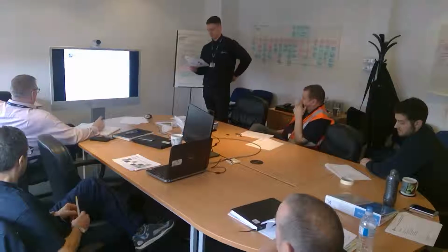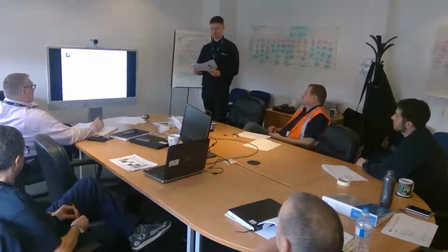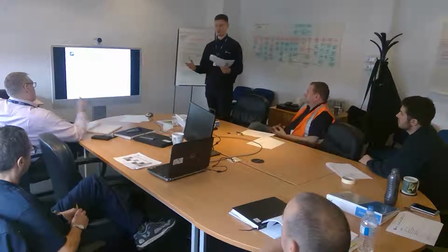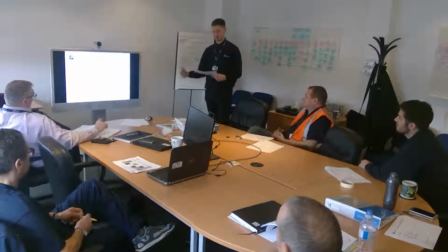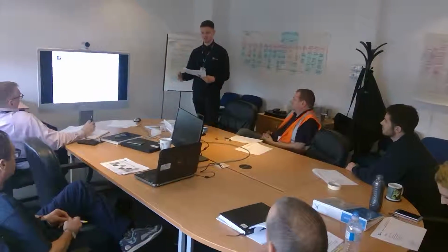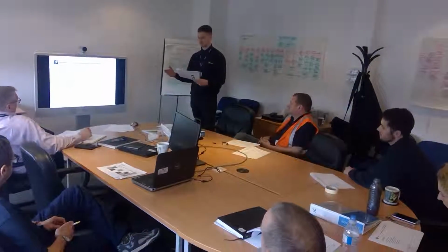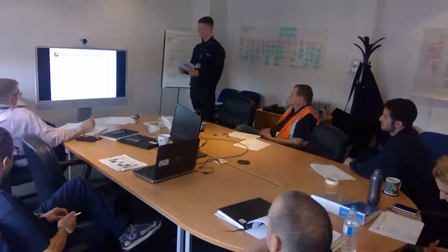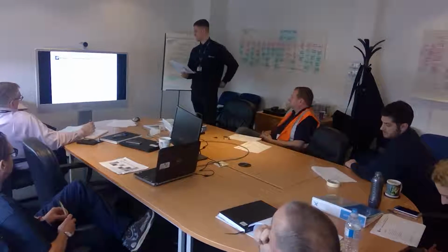Increasing flexibility. We can do this by giving a greater scope to the weld shop from an offsite point of view. We can get them involved in pre-technical reviews, and if we've got an area on a roof, for example, and we know there's going to be 800 spools on there, we bring them in as soon as we know that and say, in the next 3 months you might have 800 spools to do, so they can plan that in. And if they need to get any resources in to be able to accommodate it, then they can do. Greater employee engagement. We can reduce waiting times.